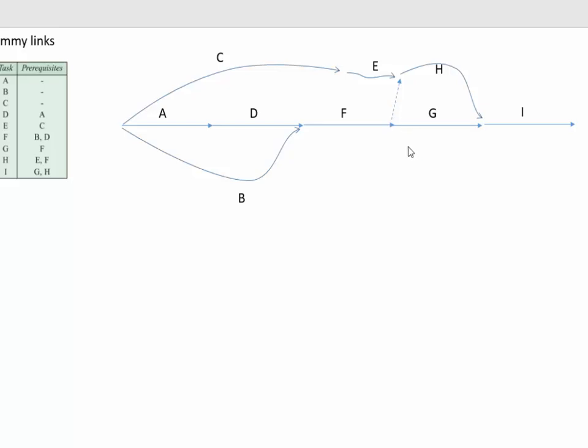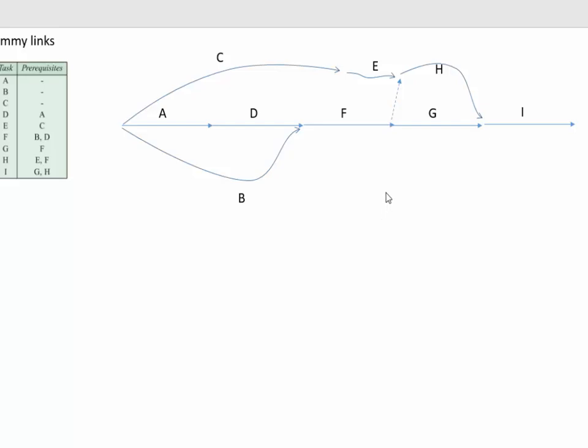So what you might need to do the first few times you do these is do what I did and actually create one that looks almost right, and then work out where the problem is and how you can separate it so that you've got a dotted line through there. Now the answer in the back of the book will look very different to what mine does here. Mine is quite organic, I guess is the most charitable thing I could say about it. But it doesn't really matter how it looks as long as it's representing the flow of the procedure from one end to the other.